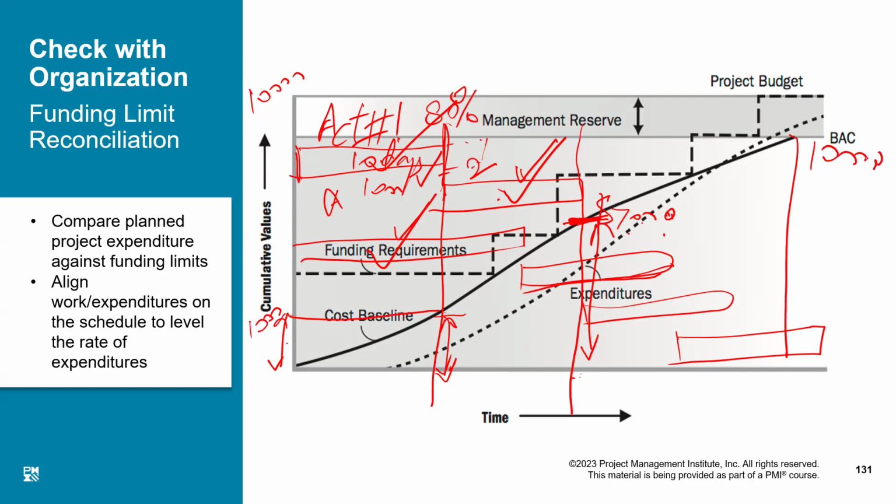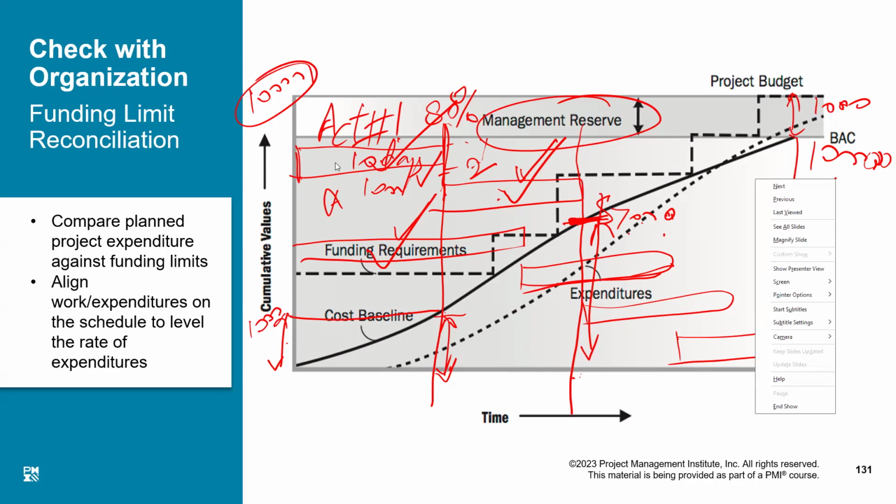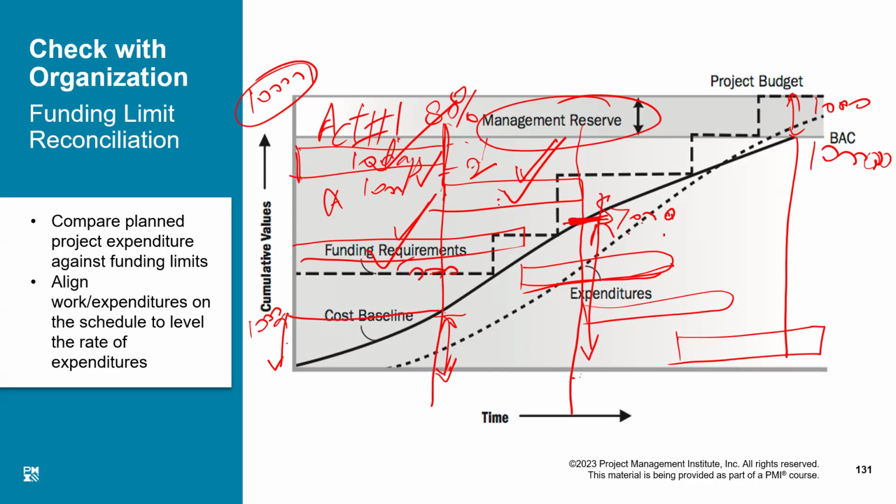$10,000. And maybe there is some extra money in the management reserve. But your project budget is actually $10,000, which I've written here. This is $10,000 for these 6 activities. The first activity may be worth $1,000, this activity may be $5,000, and this activity might be $1,000. That is the 7,000 figure. And the remaining 3 activities are, say, $1,000, $1,000, and $1,000. That totals up to 10,000.